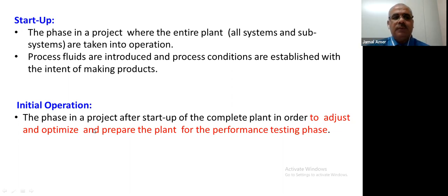We have to solve all problems which we could face. And it's preferred to wait sometimes, after all problems are solved or the control system is tuned, and the plant is running smoothly without any problem. We could wait for 12 hours or 24 hours. Then we start our performance test, which, as I said, could be continued for 12 hours or 24 hours or 72 hours.